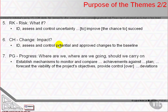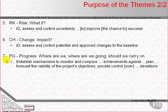The last of the themes is the Progress theme, which asks: where are we, where are we going, and should we carry on? The Progress theme explains the decision-making processes for selecting stage boundaries, defining tolerance limits, approving plans, monitoring achievements, and using the registers and the process to trigger escalations for events outside of tolerance from planned performance. Monitoring and reporting status maintains the reliability of plans as a basis to determine whether and how the project should proceed.